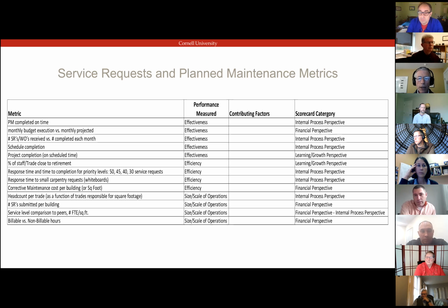I think it's a good point, Andy, because especially in that first year after you BOD a building, ideally the first several years, but especially in that first year, that's when you should be doing all the shakedown and making that construction contractor do the job right. So there's a quality aspect there.